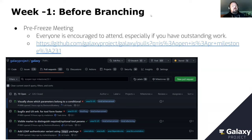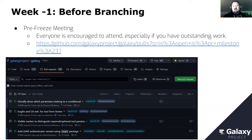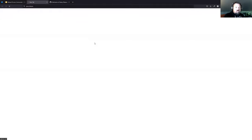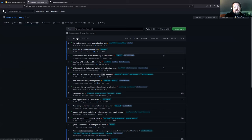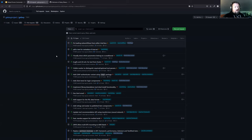Before we even freeze — I call it week negative one, with week zero being the freeze — we have a meeting that's historically been for committers but is open to anyone, especially if you have something you're working on that you want in the release. We look through all open PRs that are milestoned for the upcoming release. Right now there are 72 open PRs that all need to be either merged, bug-fixed, or reassigned to 23.2 before we branch.